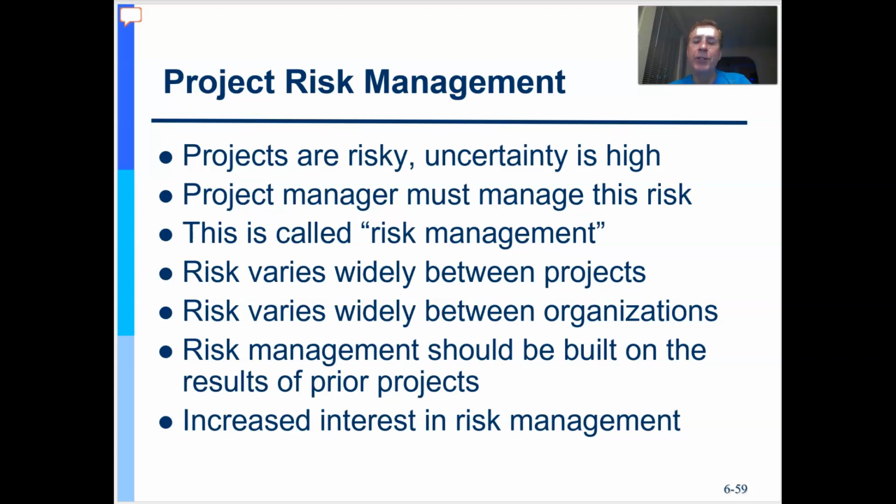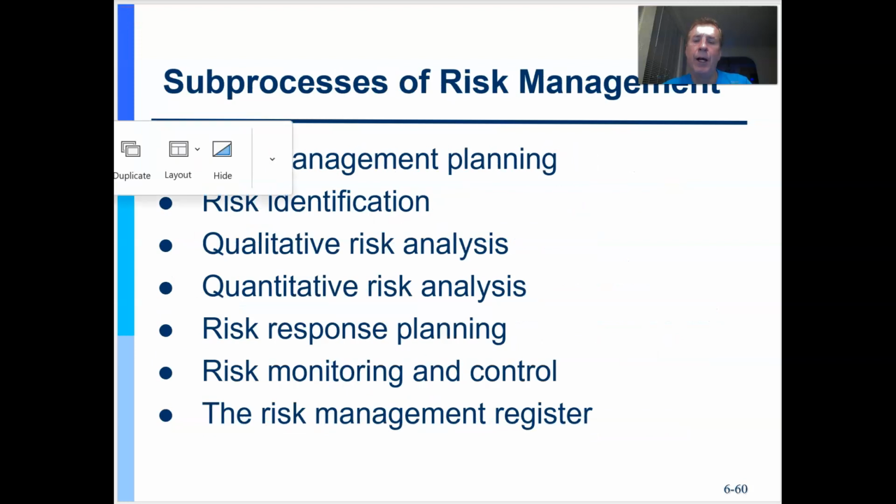And so you'll have a risk manager that works for you. You'll collect your risks. Just like the stakeholders were in a stakeholder register, which is just a list of stakeholders, you're going to create a risk register, which is a list of risks that will impact your project along the way. And then as part of that, you'll do your risk management planning.